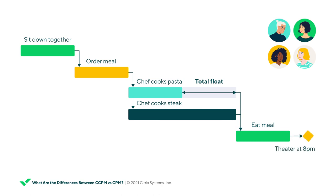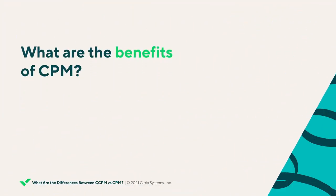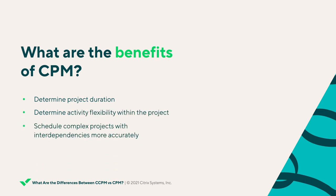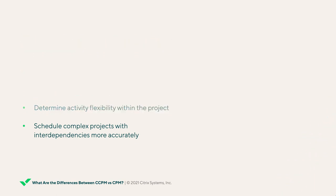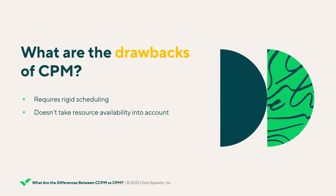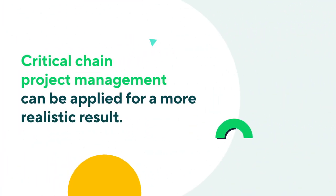Since your group is going to the theater at 8pm, Critical Path Method will allow you to determine when you'll need to make your restaurant reservation in order for everyone to finish their meal before the show. CPM therefore allows project managers to determine the duration of the entire project, which tasks have flexibility, and when the project needs to commence in order to meet a deadline. However, CPM assumes that resources for each activity will be adequate and that resource scarcity won't affect completion — which those with experience in project management know is rarely the norm.